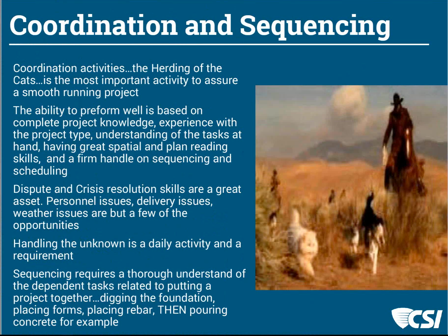And I touch on this often. You know, there was a time in my professional career where contractors self-performed much of the work on the site. Now that seems less true, and they, as a general contractor, are in more of a financial package and personnel management kind of task. So the sequencing of what these independent subcontractors and material providers do so that it relates to how the project comes together in the proper order is one of the most necessary skills that the contractor brings to the table.